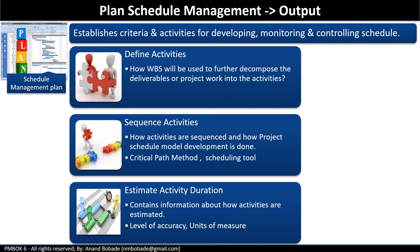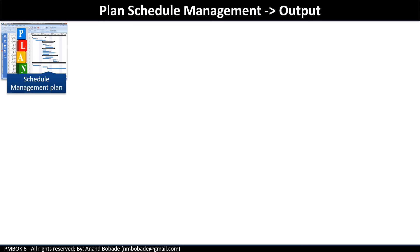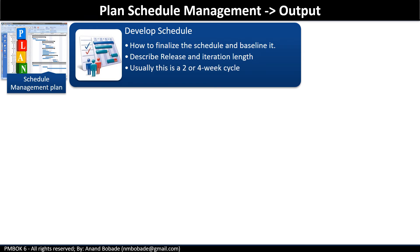For estimate activity duration, the plan contains information about how activities are estimated, the level of accuracy (meaning the acceptance range used in determining realistic activity duration estimates), and the unit of measure — what unit will be used for measuring time, such as hours, days, or months. For develop schedule, this section describes how to finalize the schedule, how to optimize it, and how to finally baseline it. It also contains information about releases and iteration length — if you are using an agile life cycle, you need to specify the sprint period, which is usually a two-to-four-week cycle, and it needs to be consistent.